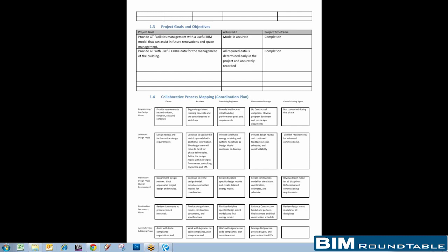Yeah, and to your point, with this BIM execution plan, I'll show you the E202 and how it was filled out by attribute, like the level of detail we're going into with a lot of different things. It ranges from 100 to 300, depending on what it is, so everybody knows how far things are getting taken.